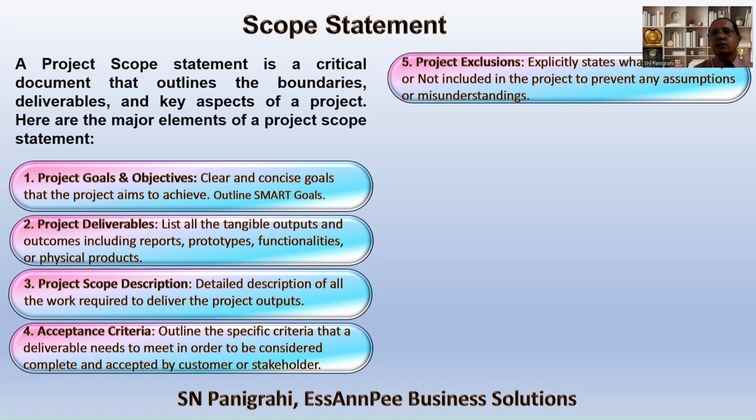Then the builder says, sir, I have done as per your plan. Exactly as per the plan I have done, everything is okay. Then arguments and counter arguments go on. Here, in this case, in the plan, all the fixtures and all things are properly designed and the builder has built as per the design and the plan. But one of the exclusions, that is, it's not specified in the contract, is the electricity connection or the water connection which is supposed to be taken from the local authorities.